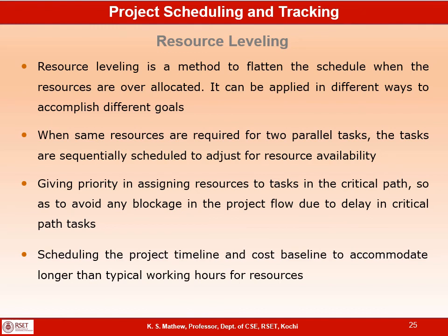the current finalized schedule which will remain fixed, based on which you are going to compare the actual progress of your project. So the tracking of the project schedule is based on the baseline you set in the schedule. So after you baseline, you can start tracking the project in order to see whether there is a schedule slippage in the project.